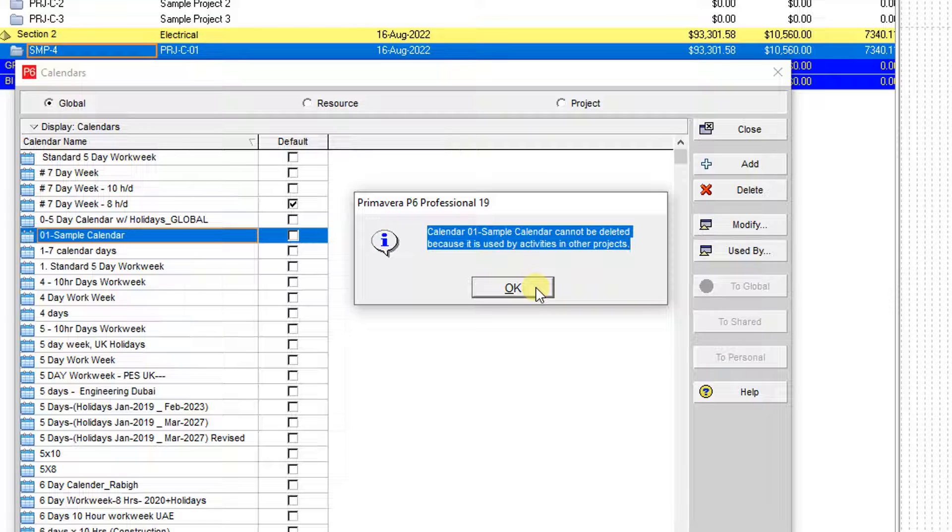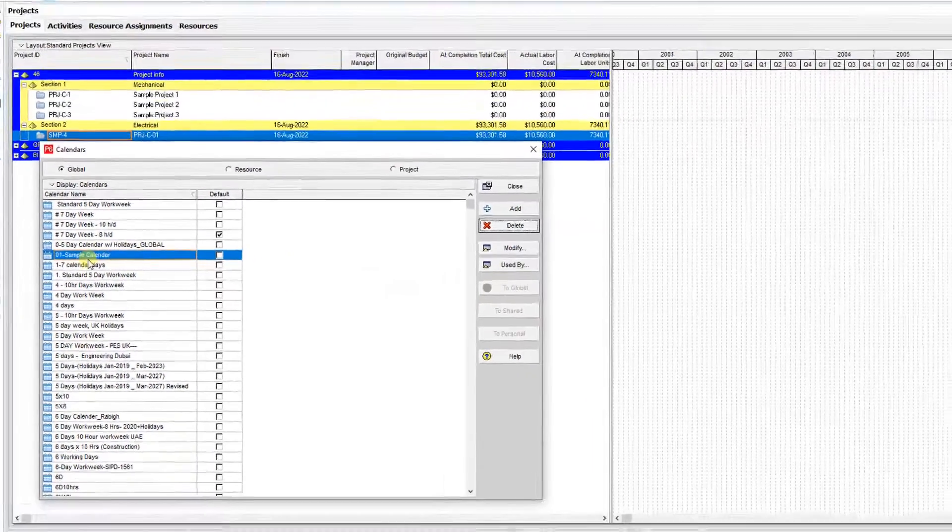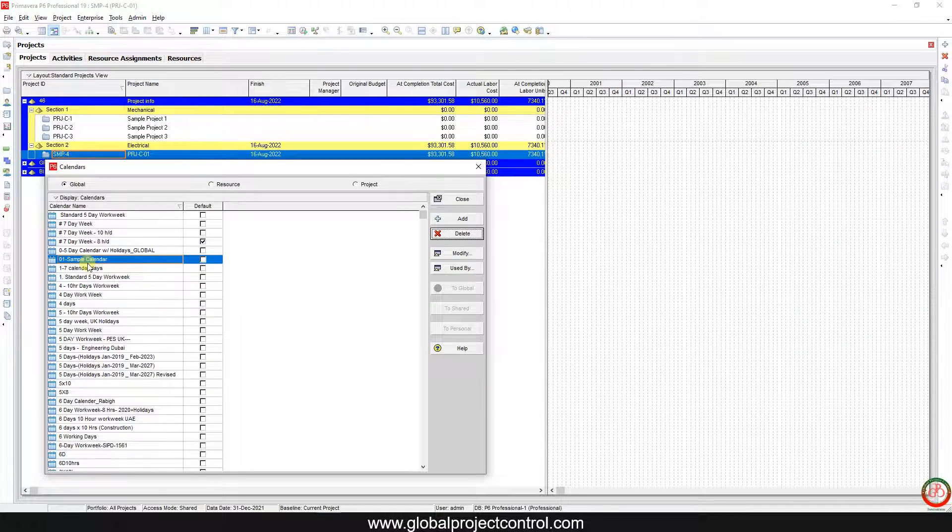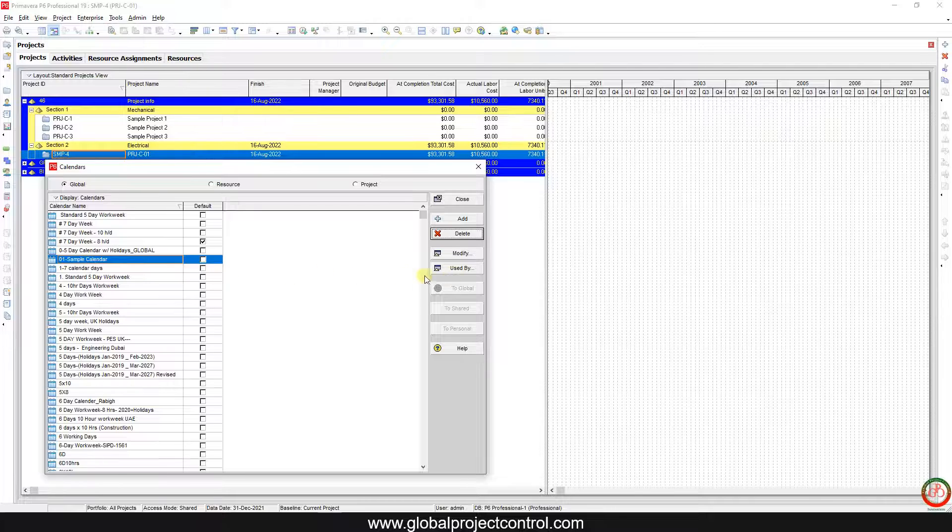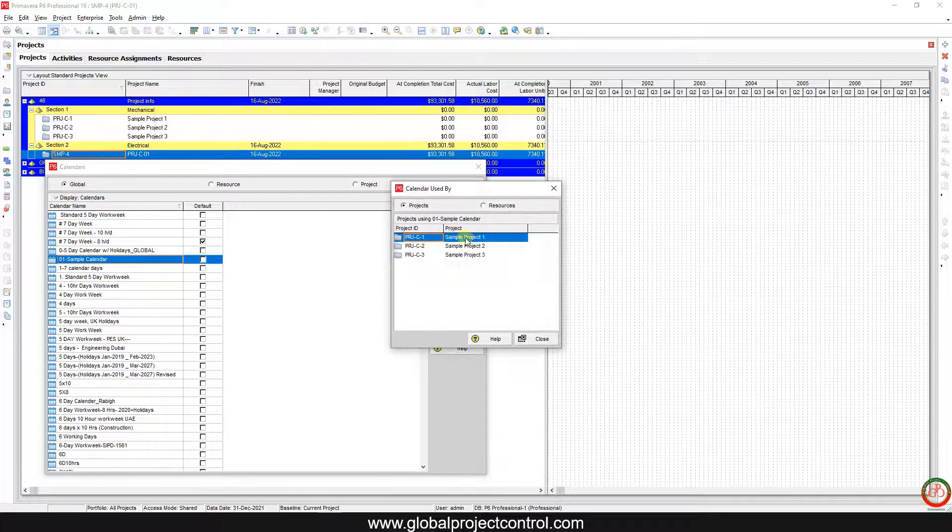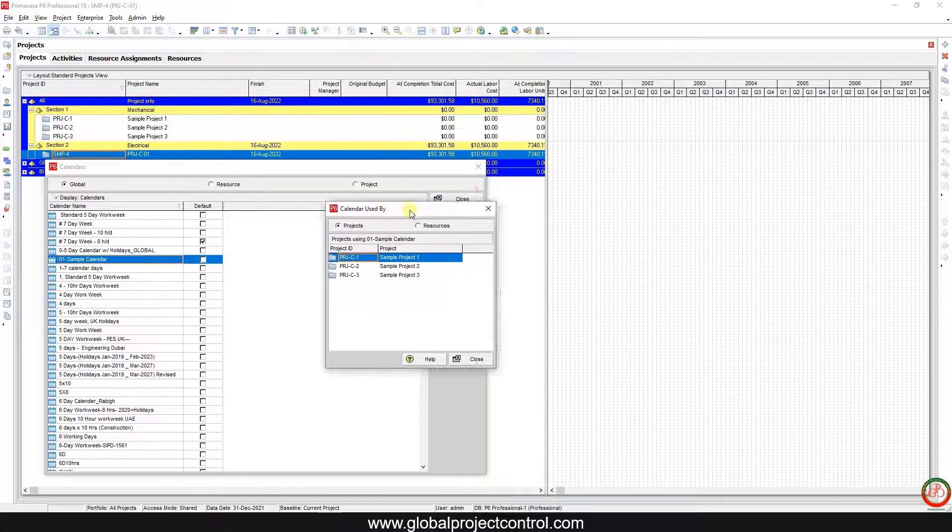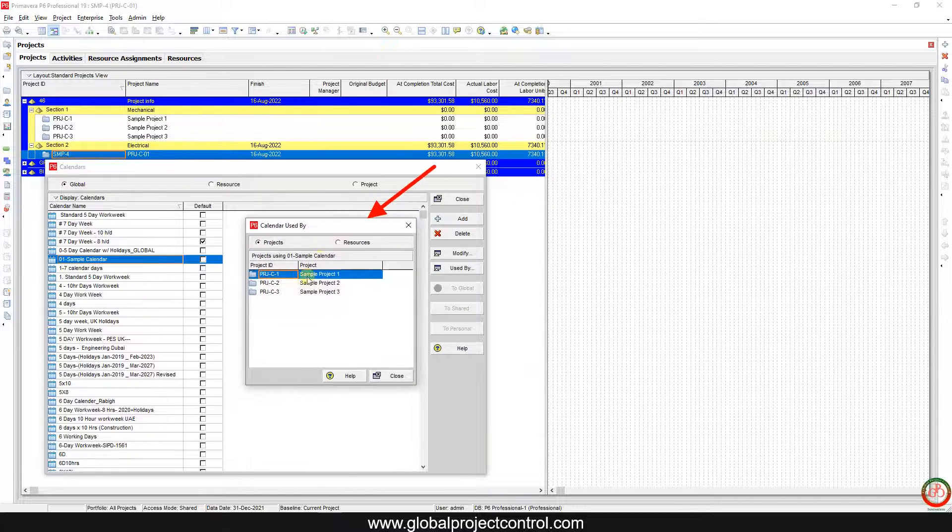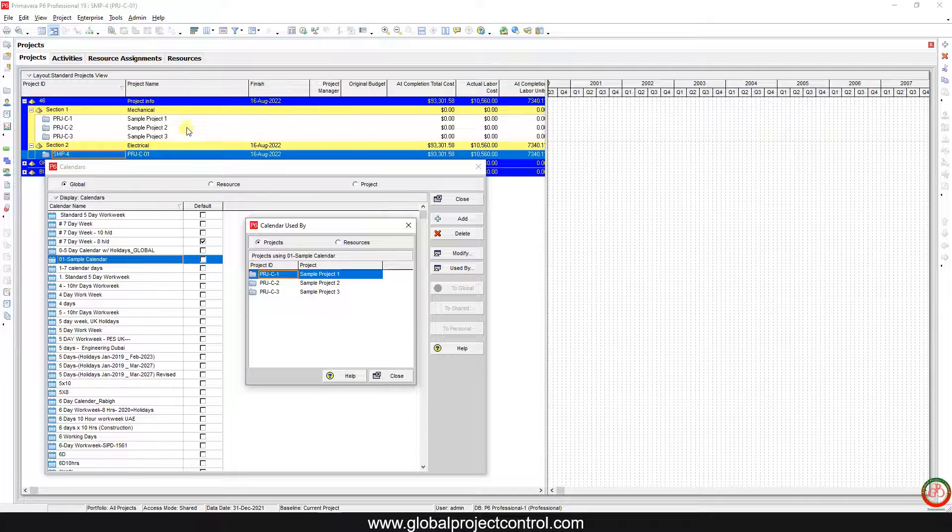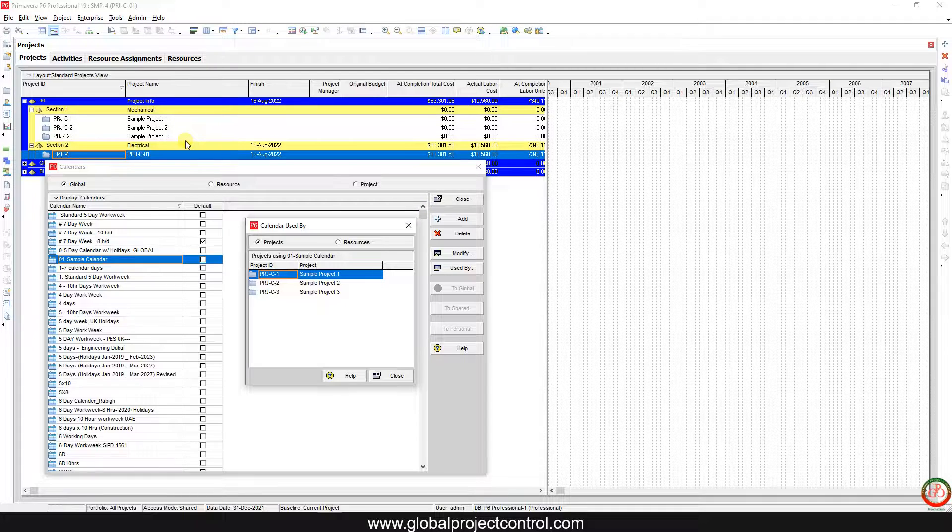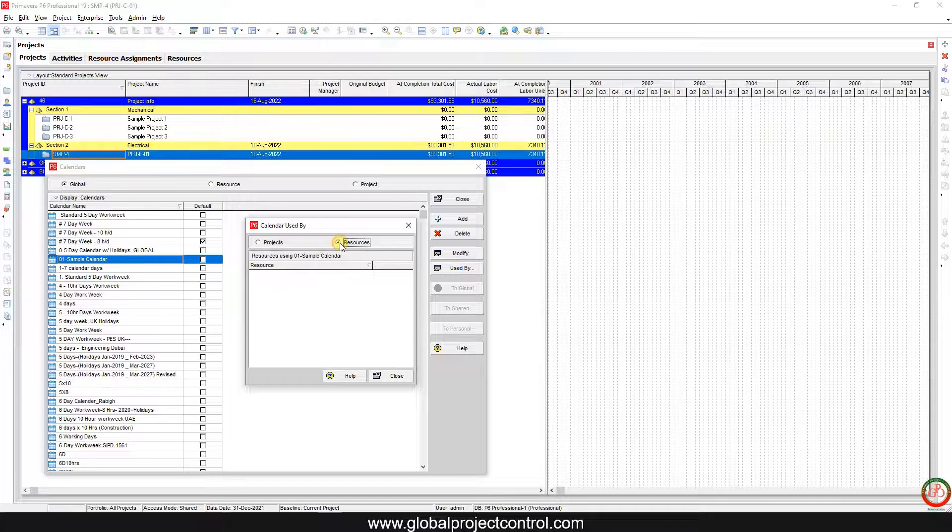So how can we remove this calendar? First of all, how can we find where this calendar is connected? If you go to the 'Use By', then you have the list of projects which are connected to this calendar. If you look at this, you can find that these three projects are connected to this calendar. Also, if you use this calendar for resources, you have this item here.